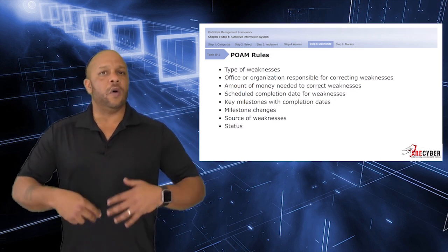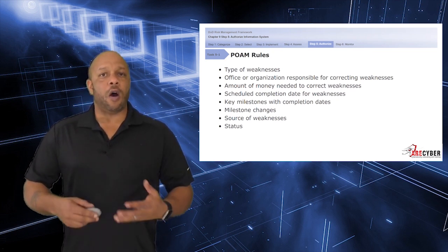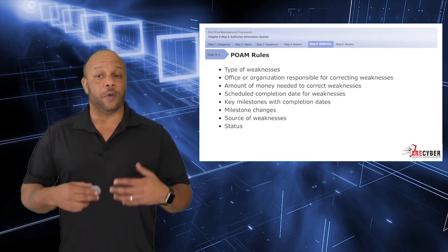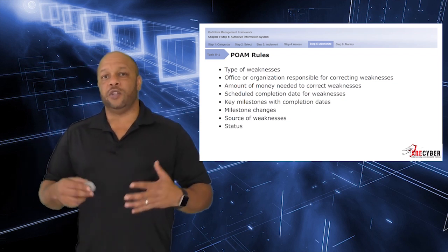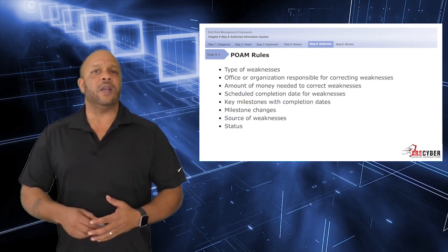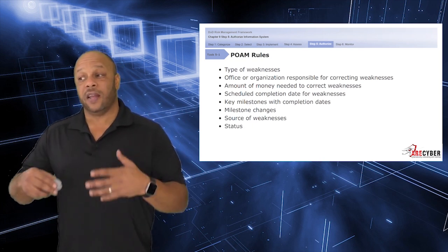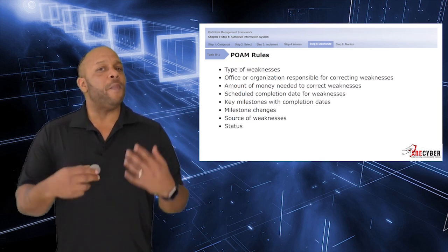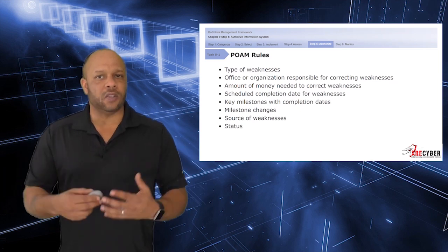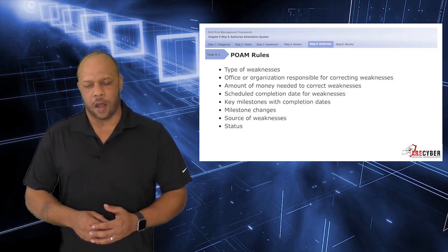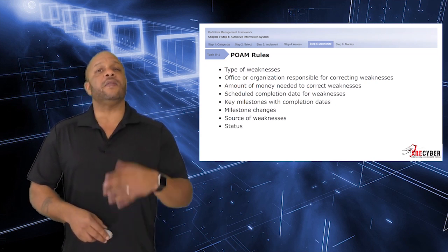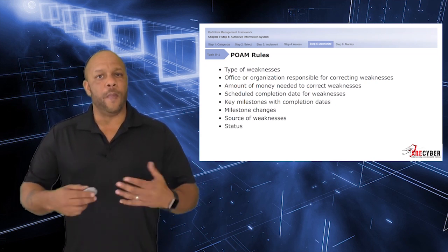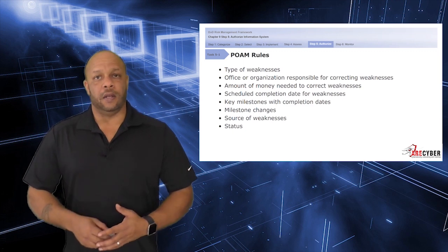You'll identify the type of weakness for the information system, the office or organization responsible for correcting that weakness, the amount of money needed to correct the weakness itself, scheduled completeness dates, as well as key milestones and the completion dates of those milestones. Any milestone changes—if you miss a milestone, it needs to be updated and corrected—the source identifying the potential weakness itself, and the ongoing status: met, not met, or implemented.